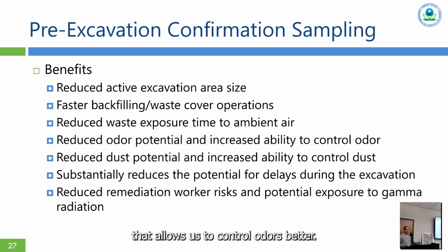That allows us to control odors better. It allows us to control dust better and particulate migration. And here's the biggest part to me, it substantially reduces the potential for delays during RA, because we are not potentially having to change the excavation plan while it's happening and step out and have engineers do new grading plans, and we avoid all of that.